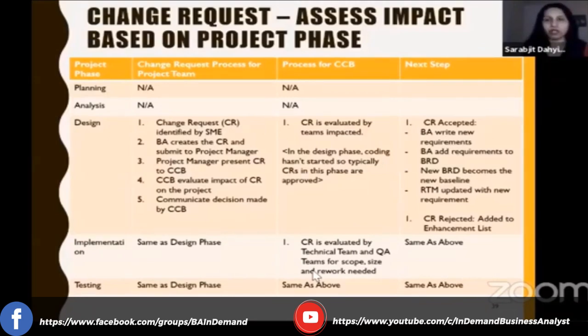So let's say when we first started building Amazon, his fee was 10% of the product cost. And then as he started to see there are lots more people coming on and he wanted to make it more attractive, he says, okay, instead of 10%, let's change it to 5%, right? That's a change because we've documented and we've programmed for Amazon to take 10% of the product fees, and now he wants to change it to 5%. So that's a change. So any change that you have on your project is called a change request.